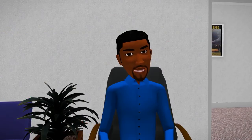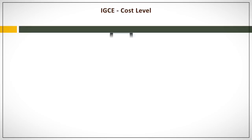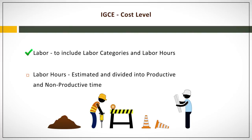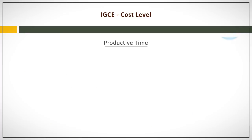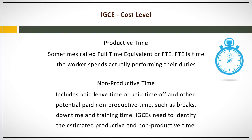For my current purchase, it looks like I'm working with a cost level IGCE. Can you help me understand these cost elements in further detail? Sure. Let's start with labor. The requiring activity should identify all labor categories required for each task by contract line item number for each year of anticipated effort, to include all options over the life of the contract. Labor hours are estimated but are divided into productive and non-productive time. Productive time, sometimes called full-time equivalent or FTE, is time the worker spends actually performing their duties. Non-productive time includes paid leave time or paid time off and other potential paid non-productive time, such as breaks, downtime, and training time. IGCEs need to identify the estimated productive and non-productive time.